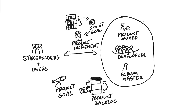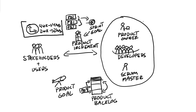The Sprint Review happens towards the end of the sprint, involves the entire Scrum team collaborating with the stakeholders and users, and is time boxed to four hours for a four-week sprint, or two hours for a two-week sprint, and so forth.